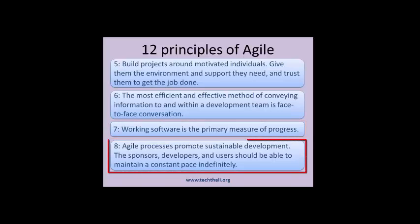Principle 8: Agile processes promote sustainable development. The sponsors, developers, and users should be able to maintain a constant pace indefinitely. Agile has the ability to precisely determine the amount of time a project or feature will consume. After a few deliveries, the development team will produce the most valuable business number: velocity — the amount of work the team can do in one iteration.